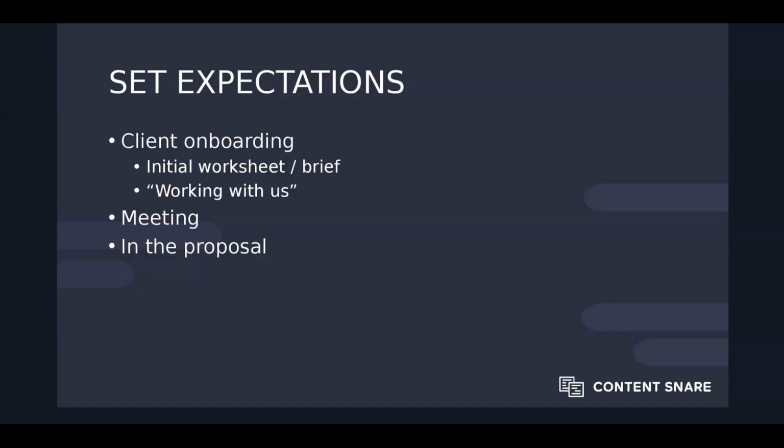And then we always used to use the same clause for design feedback and stuff too. It's like you've got 3 business days for feedback, and if we don't get it in that time, then we put it on pause until we get the feedback, and then that's when you go back into the queue. Yep. So it's the kind of thing that just makes the client go, holy crap, I better get this stuff sorted. Yeah, agreed. I mean, it is a bit harsh, and some people might not be comfortable doing that with their clients, and it really depends on your price points and that kind of stuff. But that was our thing. We said that this is how we keep our prices where they are, by always working. So if you're delaying us, then we have to put it back.